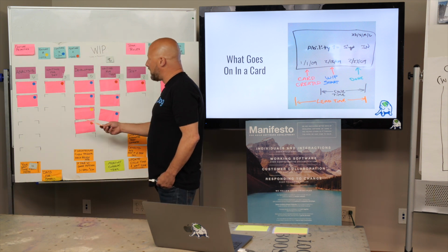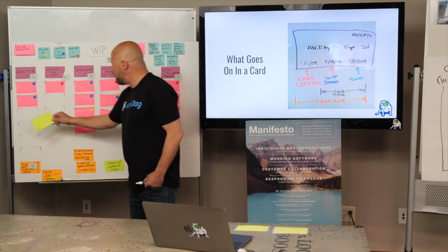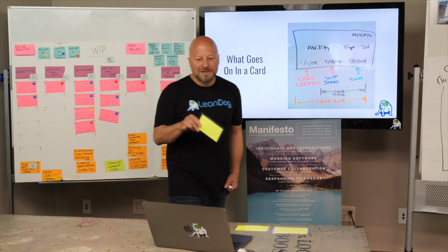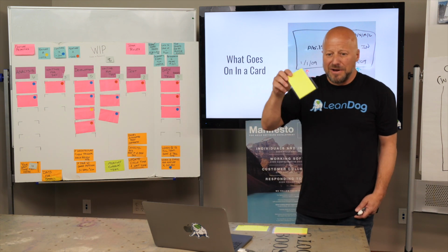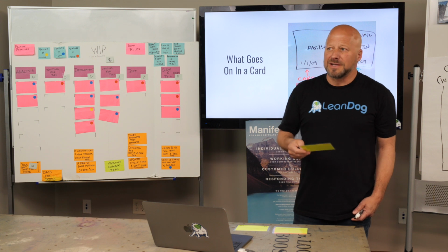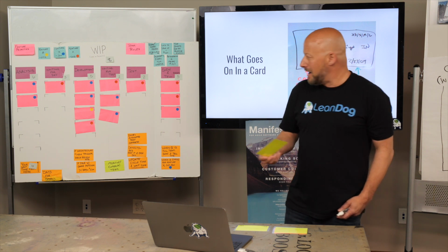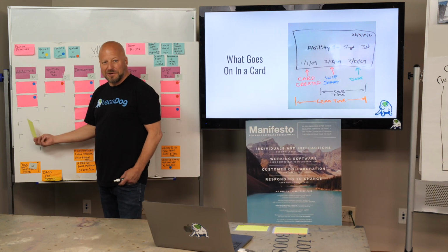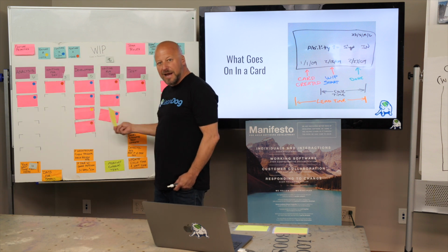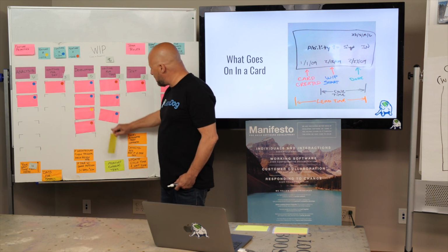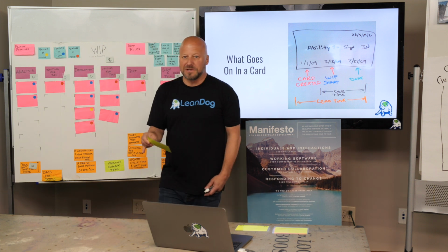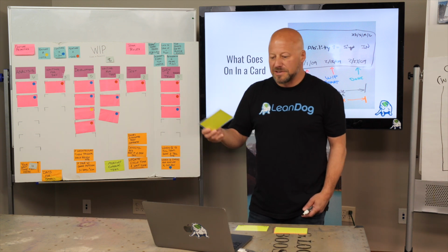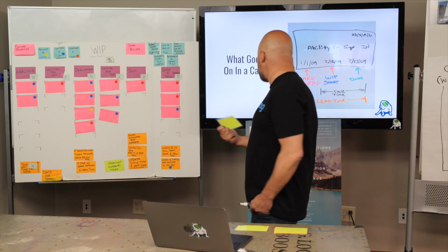So this is the beauty of Kanban, in my opinion. We measure the cost. So when I tell you that, hey, when we estimate and say, hey, it's a medium card, it's about 4 days of work, right? It might take 14 days to get that 4 days of work done, because things are getting delayed for knowledge reasons, because we aren't managing knowledge transfer efficiently, and cost is compounding. So that's why I like cycle time.